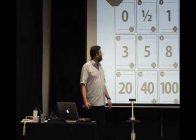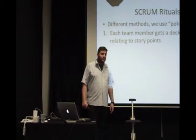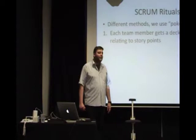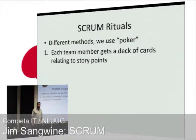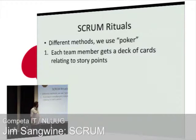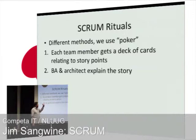It's all about helping the business plan for the amount of work that will be done. Every team develops its own values for estimation — you can't compare story points between teams. You can probably compare task hours, as those are what you actually measure and represent the most fine-grained level of estimation in the process.